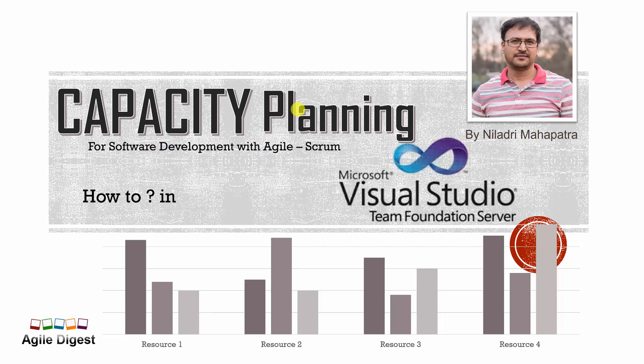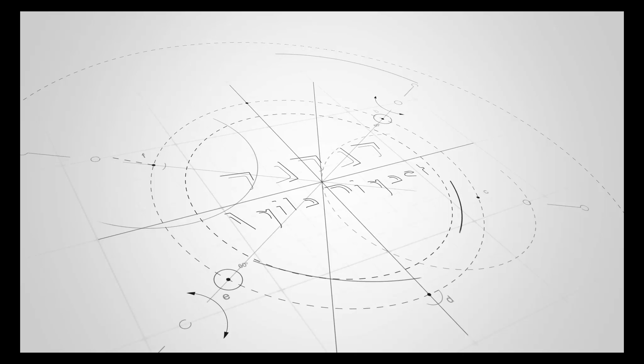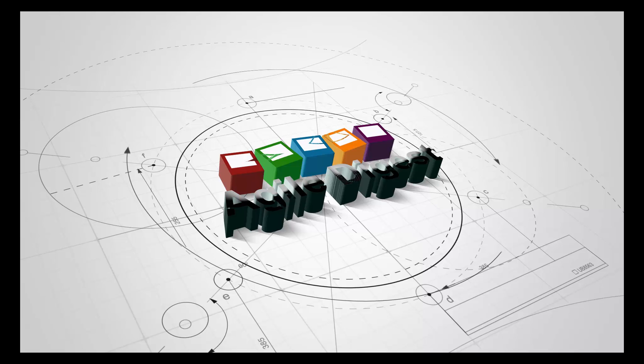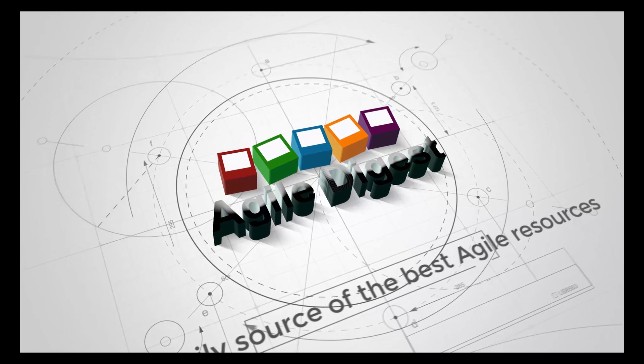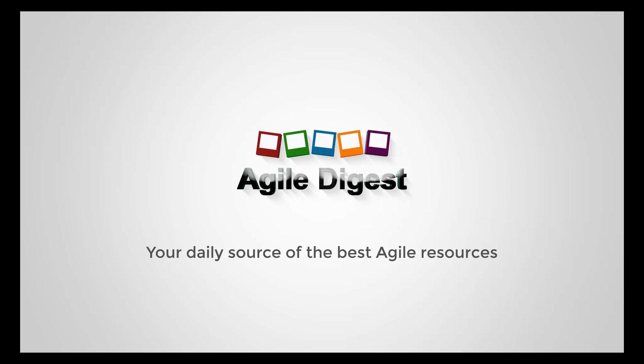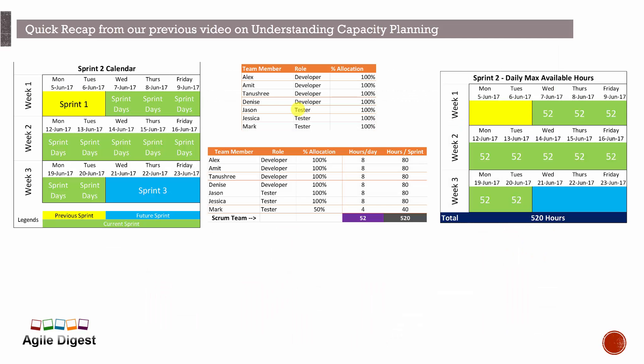Let's assume our sprint is starting on 7th here and ending on 28th June. This is a 10-day sprint, we have these many developers and testers working here, and they are 100% allocated initially. Then we change the allocation of Mark to 15%, so the default working hours instead of 8 reached to 4.